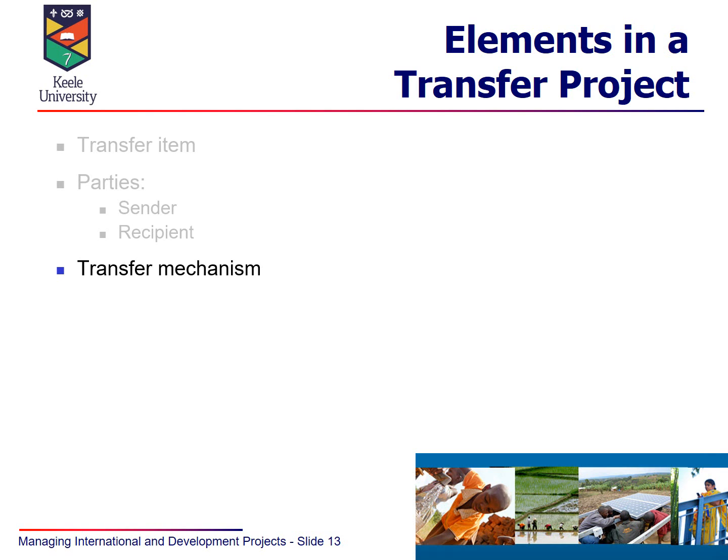And one way that's often used is to say that the sender, the people who are knowledgeable, the people with the technology, will build it, will operate it and get it up and running, and then we'll transfer it to local operation at a later date, what's known as build, operate, transfer. Sometimes this is also seen as a turnkey project, i.e. that the user at the other end, it's all set up, it's made operational, and then simply they need to turn the key for it all to operate.